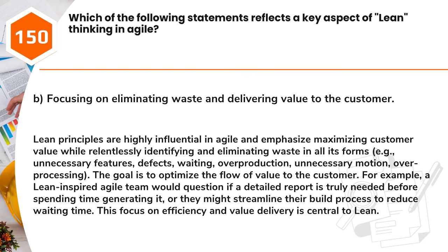Answer: B. Focusing on eliminating waste and delivering value to the customer. Lean principles are highly influential in Agile and emphasize maximizing customer value while relentlessly identifying and eliminating waste in all its forms, e.g., unnecessary features, defects, waiting, overproduction, unnecessary motion, overprocessing. The goal is to optimize the flow of value to the customer. For example, a lean-inspired Agile team would question if a detailed report is truly needed before spending time generating it, or they might streamline their build process to reduce waiting time. This focus on efficiency and value delivery is central to lean.